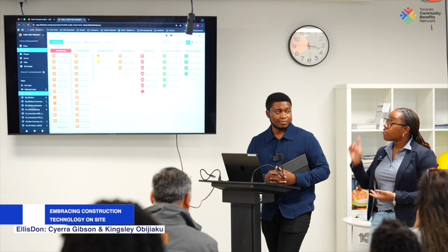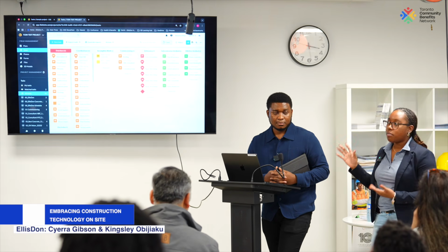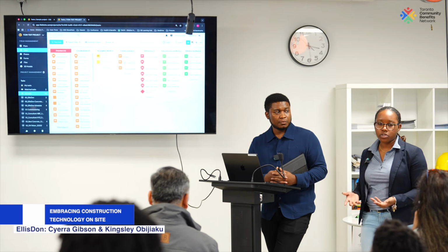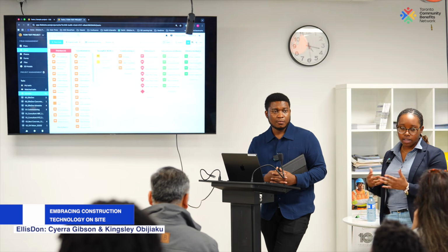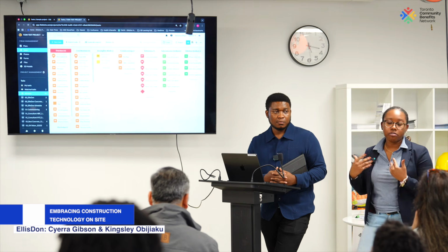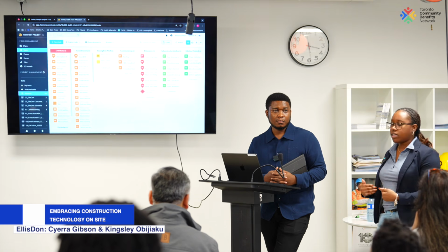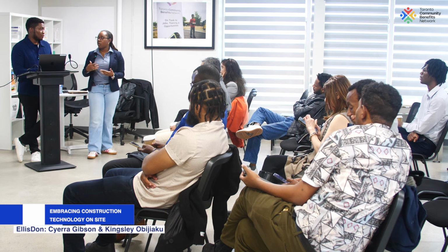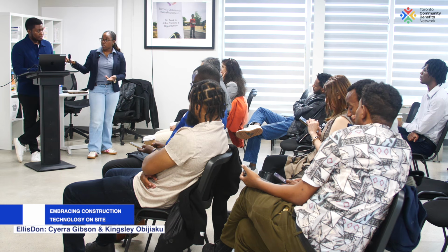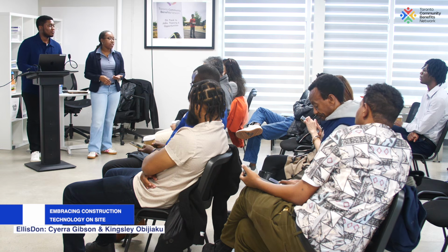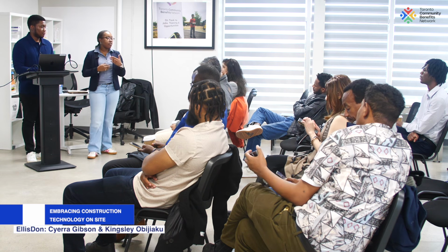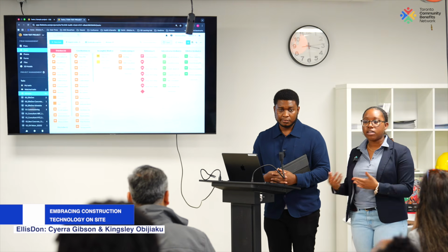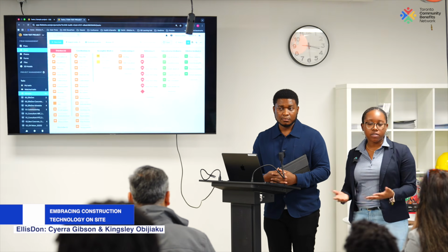Well, yeah, for this particular instance, this is under the assumption that a subcontractor has already been awarded whatever scope of work they bid to do. They've already been awarded the work, so we've already signed them on as part of this project. At the beginning of the project, there's always an onboarding process, and part of the contract agreement indicates we will be using this software for managing field operations, project management and invoicing. That is also part of the initial startup.